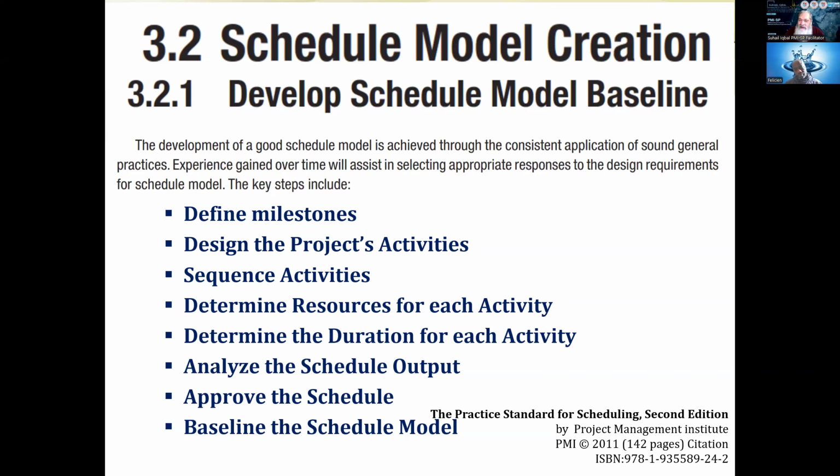When this is approved, this time, it is called rebaselining. Your schedule model will be once again rebaselined, and this can occur many times during the life of the project. A project can go through many cycles of rebaselining.